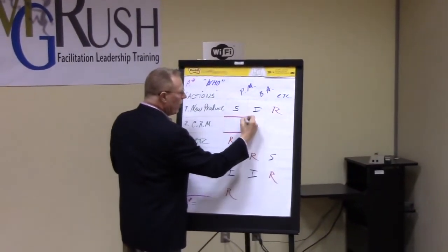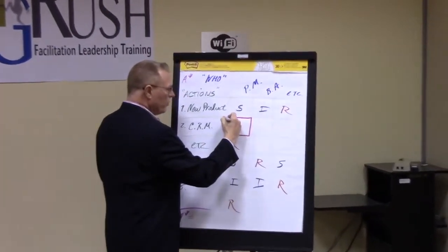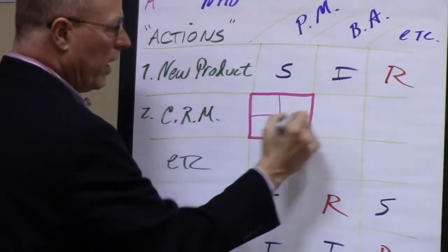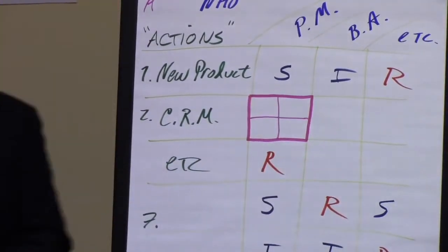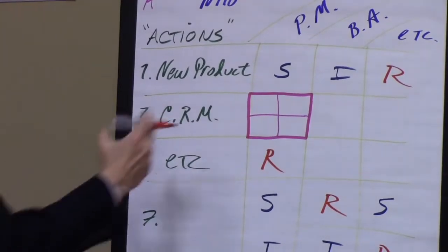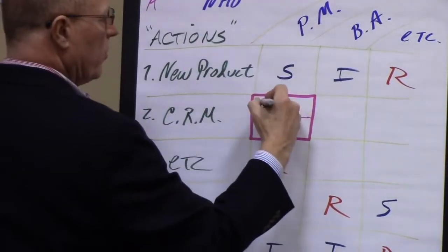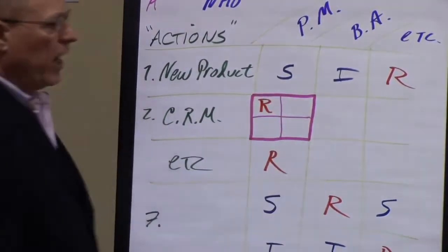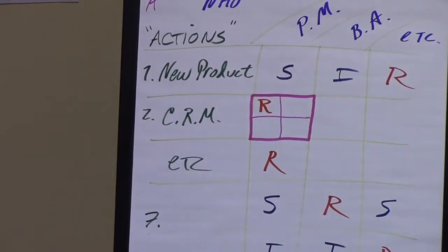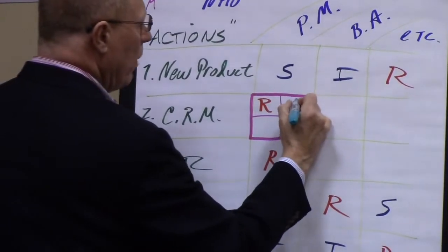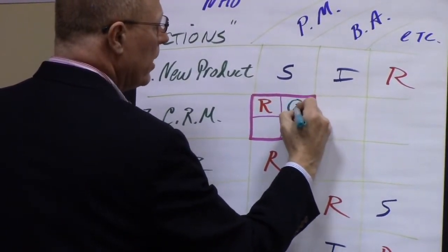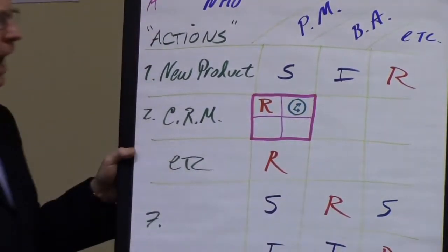But from that day forward, I've learned the power of the cell. We don't have to use all of that space for our big red R. We can, in fact, split this into 4 separate spaces. Once we know that, in fact, the PM is going to be responsible, we can capture that sense of responsibility. We can address her question by simply asking, approximately, when will this be complete? And here we're simply representing time with a little clock.